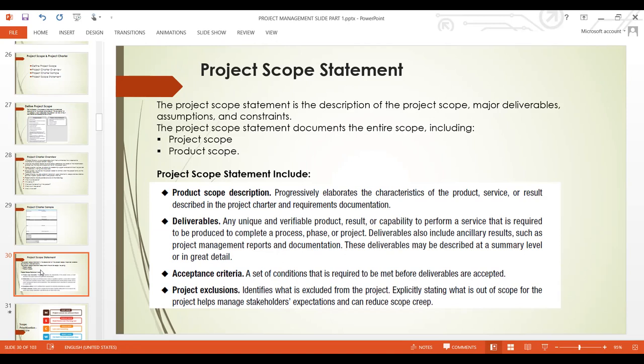For instance, what is not acceptable in this project can be, we have a budget of £10,000 to deploy this software, and £10,000, no more, no less. Anything outside £10,000 is not authorized. This is a boundary. And because of this, this project cannot exceed 6 months. So you have created a boundary that within the budget, it can't exceed £10,000, and within the timeline, it can't exceed 6 months. This is a clear boundary.